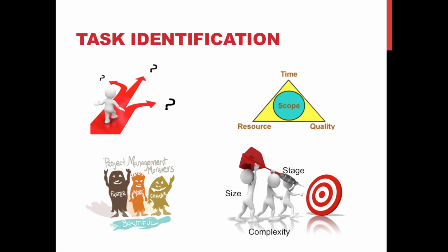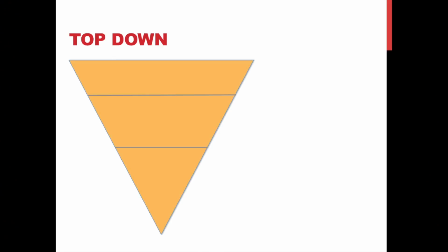There are four main methods of project estimation. Firstly, the top-down and bottom-up approach are used for time and cost estimation. The top-down approach typically relies on cost histories from past projects and knowledge of the specific parameters of those projects. In the top-down estimating technique, a cost is allocated to a raw material, service, or labor required for the project. Together with the estimated number of units needed for each, a sum is found in order to estimate the total